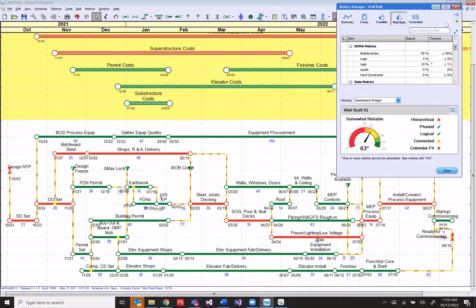Yeah, so that was more or less just during your resource presentation. I was looking at it saying, I know sometimes you don't want to put redundant links inside, but what we typically do is create a soft link as a resource link, and then we fade it. That was not really a question, more a tip for other users to potentially implement in their schedules, in case they didn't want activity D to slip into activity B because the resources are flowing from D to B. Yeah, you could always add in the soft link. I like that idea. That's cool. It wasn't really a question, just a comment. That's all. Thanks, I appreciate it.